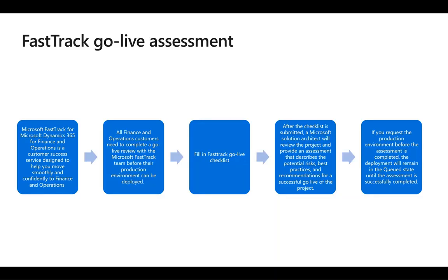When the assessment is completed, the solution architect will indicate that we are ready to request the production environment in Lifecycle Services. If we request the production environment before the assessment is completed, the deployment will remain in the queue state until the assessment is successfully completed.